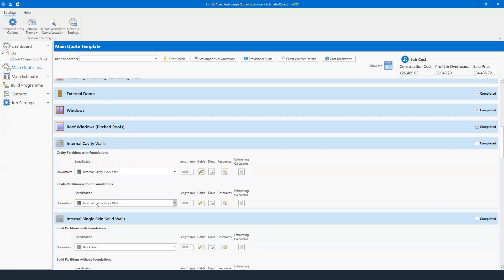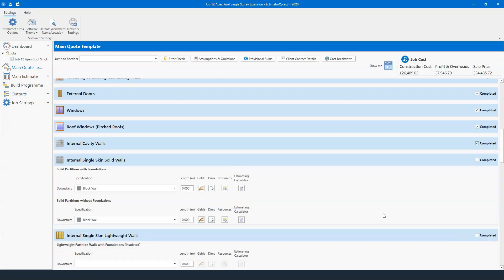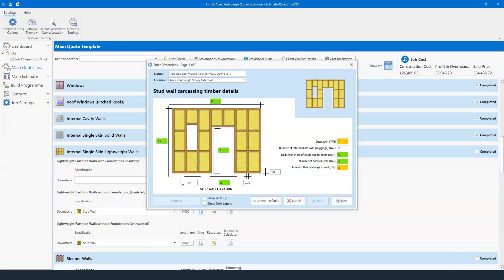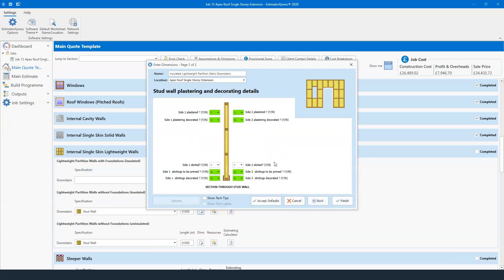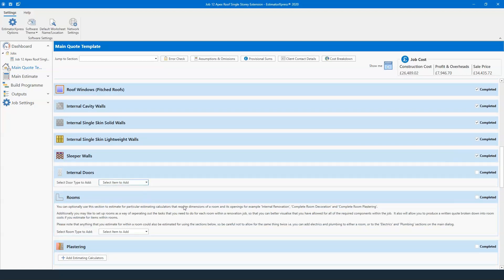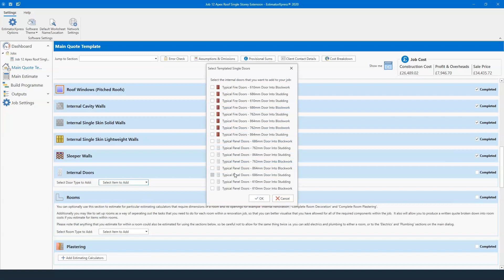For internal walls, depending on whether you're building with them — you have internal cavity walls, single-skin walls, timber-frame or metal-stud partition walls. Going into dimensions you've got the height, distance of the studding centers, and any doors you want to add. Then plastering and decorating options next to that. We also have sleeper walls if needed, and internal doors — fire doors and panel doors in different sizes, going into blockwork or studding. The difference in our software is that blockwork calculates for a concrete lintel whereas a stud wall won't — but it does calculate for door linings as well.